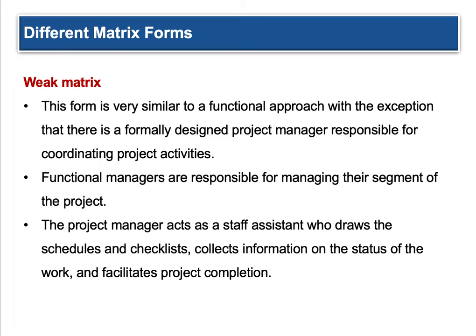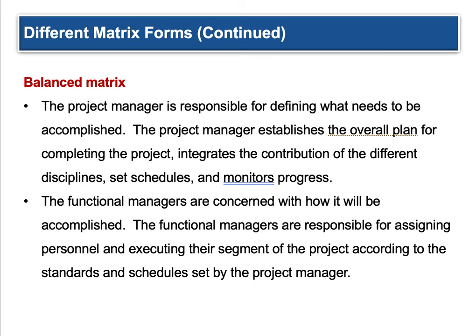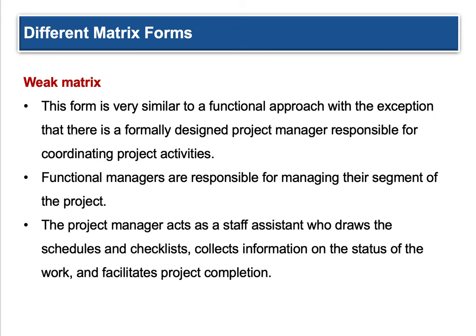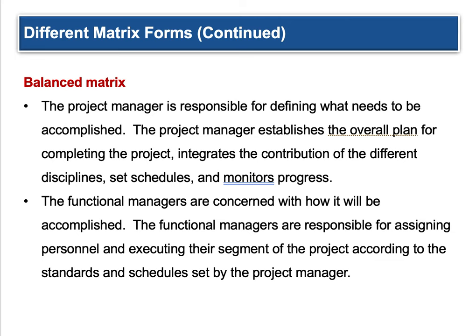In a weak matrix, the functional manager is responsible for managing their segment of the project — they're the owner. That takes out the "lack of ownership" disadvantage. The project manager acts as a staff assistant who draws schedules, checklists, collects status information, and facilitates project completion. In a balanced matrix, the project manager is responsible for defining what needs to be accomplished, establishing an overall plan, integrating contributions of different disciplines, setting schedules, and monitoring progress. Functional managers are concerned with how it will be accomplished — they already have enough to do. They're responsible for assigning personnel and executing their segment, but also must get their other jobs done. So weak leans more functional; balanced is roughly 50-50 between project and function.